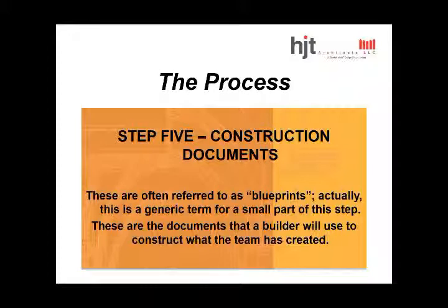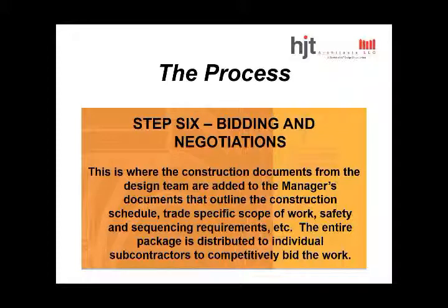Next in the process is the bidding and negotiation, and that's where we take those blueprints, construction documents. You either integrate a construction manager, but we help you to send these out to specific trades or general contractors, and they then bid and eventually give prices back, and then eventually negotiate those prices so that we can help get you competitive bidding so you can get your final solution for the very best value, least amount of dollars.